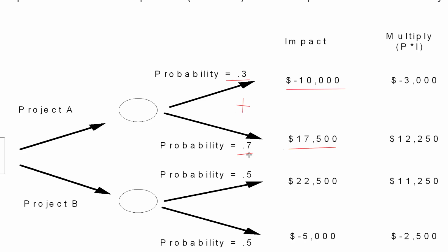Now, the moment they are equal to 1, and where is this coming from? It is the law of probability: the sum of probability of all the possible outcomes of a single event should be equal to 1, which means it's either your engineers don't get it right or they get it right. And these are the probabilities, and this is equal to 1.